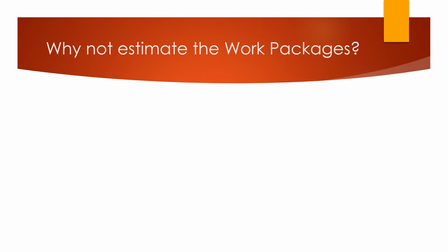Now, a good question again would be, why not estimate the work packages themselves? I mean, do you have a lot of time on your hands that you're dividing the work package further? You don't have any other work to do? Well, the thing is, work packages are large, right? They are a blob of work. It's a lot of work. A work package could be an entire coding completion, or a coding completion for one module. That is going to be large, and that may involve several activities.